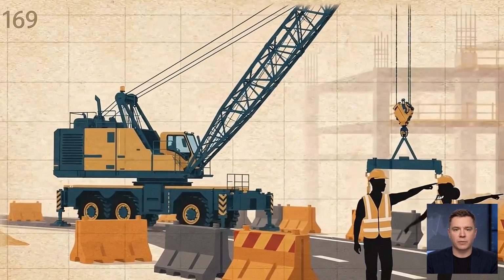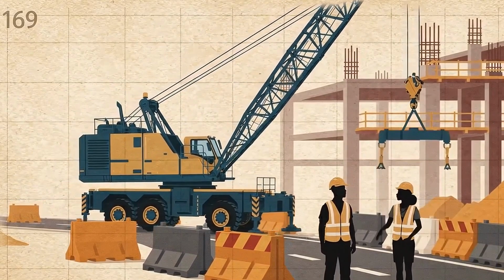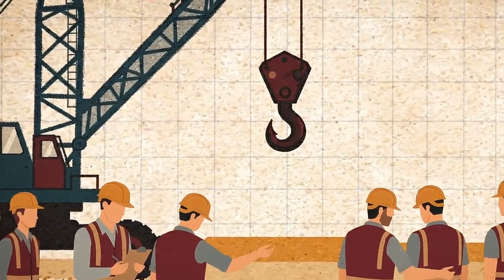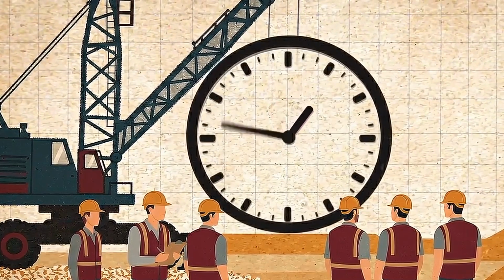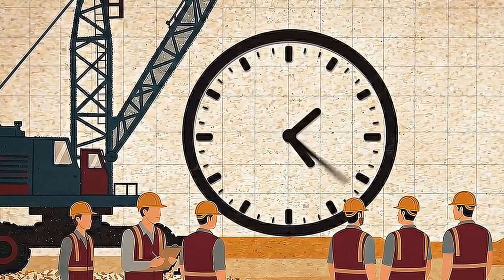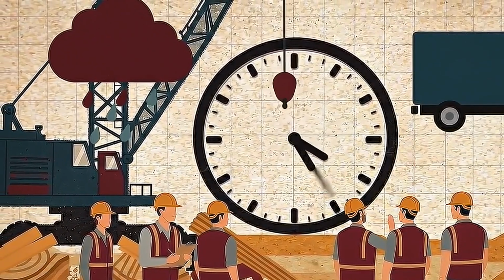The machine is expensive because it can make a difficult step physically possible under constraints that matter to the larger project. If that capability avoids an extra disassembly cycle, a longer closure, or a different erection sequence, the customer is evaluating the cost of the whole project path, not simply the crane invoice. An extreme crane can be economical because it buys time somewhere else.